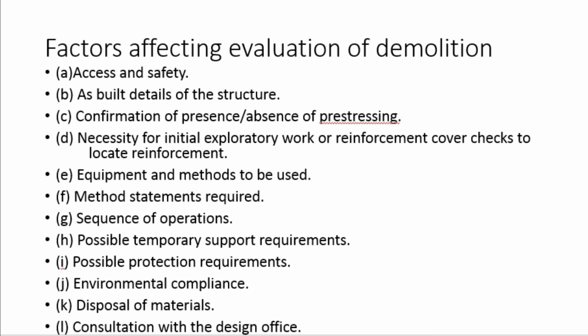As-built details of structures, confirmation of the absence of distressing, initial exploratory works, equipment and method to be used, method statement required, sequence of operation, possible temporary supports, possible protection equipment requirements, environmental compliances, disposal of material, consultations with the design office.